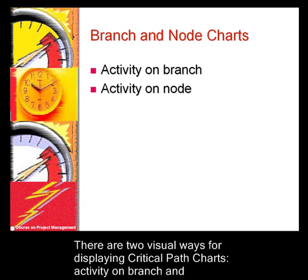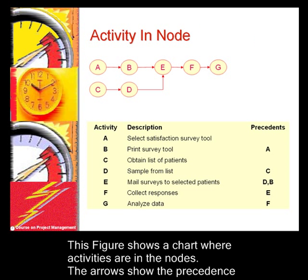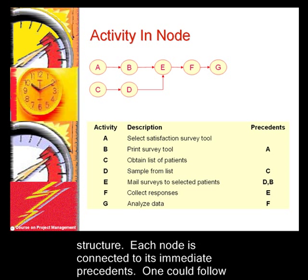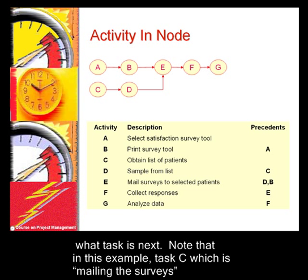There are two visual ways of displaying critical path charts: activity on branch and activity on node. This figure shows a chart where activities are in the nodes. The arrows show the precedence structure. Each node is connected to its immediate precedence. One could follow the arrows backwards to find what is required for each task and forwards to see what task is next.